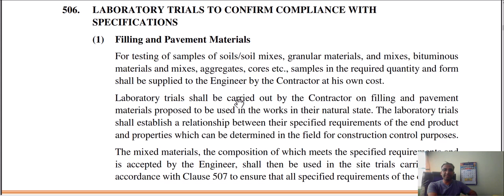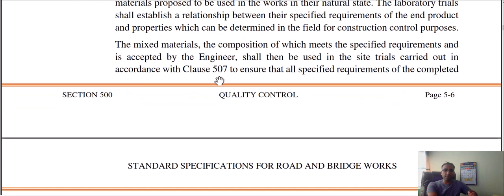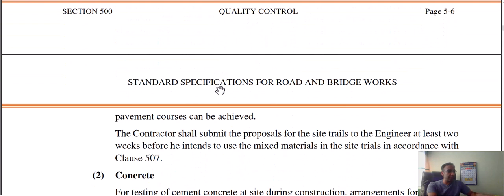Laboratory trials shall be carried out by the contractor on filling and paving material proposed to be used in the work in its natural state. The laboratory trials shall establish a relation between the specified requirement and the property which can be determined in the field for construction and quality control purposes. The contractor shall submit the proposal for the site trials to the engineer at least two weeks before he intends to use mixed material in the site trials, in accordance with clause 57.